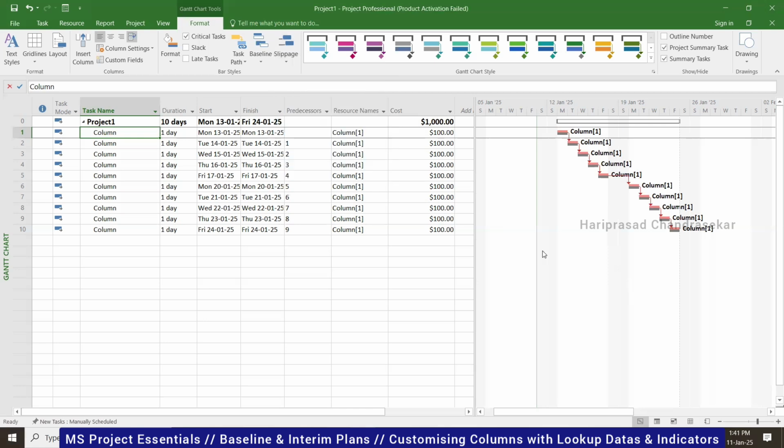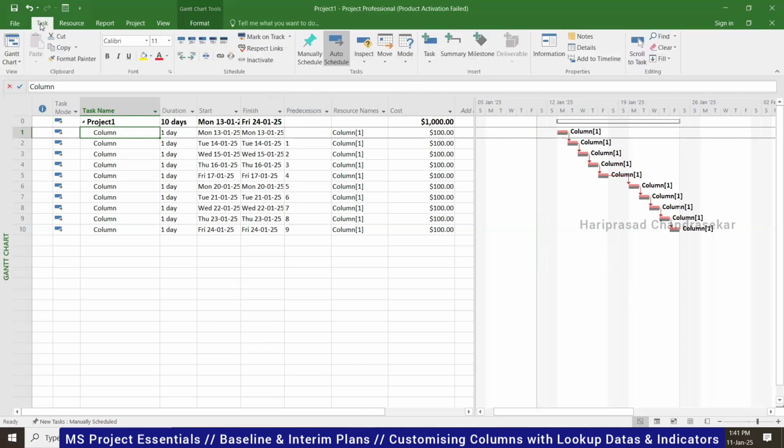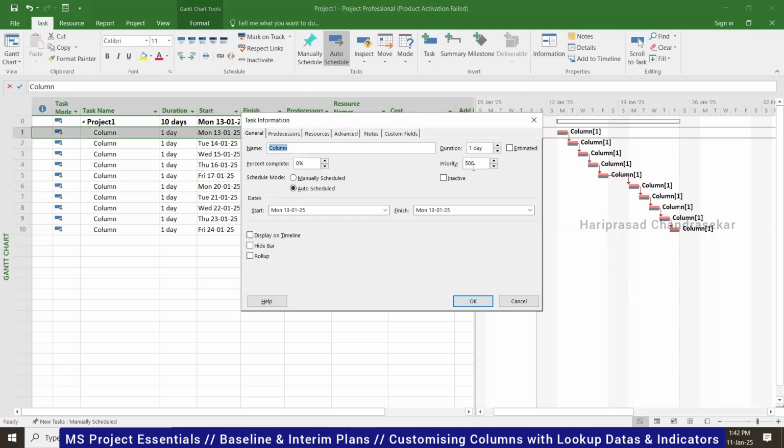So very simple. Now we can keep on applying the actuals. Here we have 100 percentage, 75 percentage, 50, 25 like that. But normally it will not be like this. Anywhere 33 and all, how will you put that? Then you can go to information and put it there. So this is applying the actuals. Here you can put the percentage, either 23.5 or 35, 38, whatever percentage.